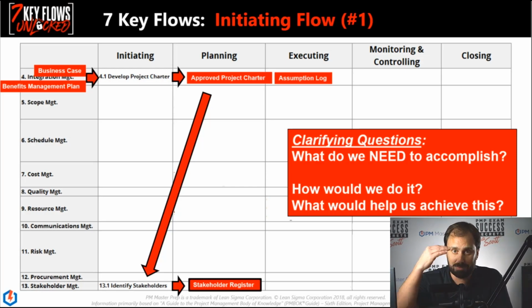Okay. Now it comes down to names, and then we go sideways on this Excel file if you want to hold it that way. All right. Their contact information, their department, their experience, all those different things. Then we get into the power level that they have, the interest, the engagement relative to our project. Now, what are we doing here? We're setting ourselves up to be able to engage them correctly, use them, leverage them, manage with them in the future well.